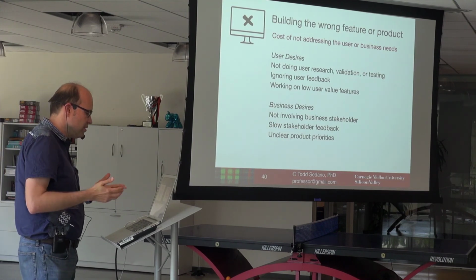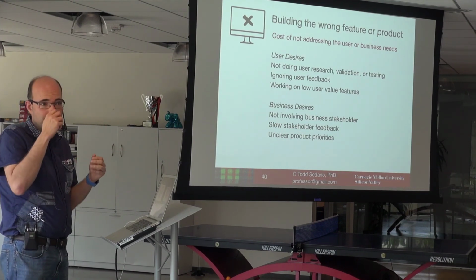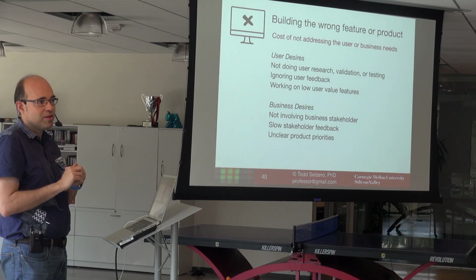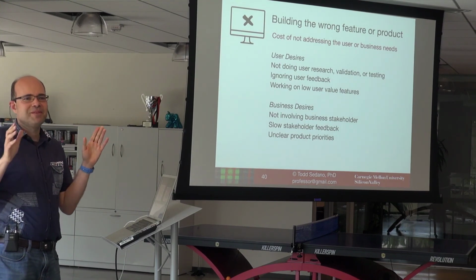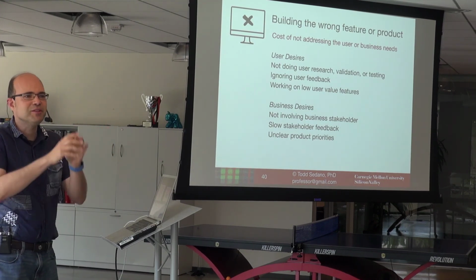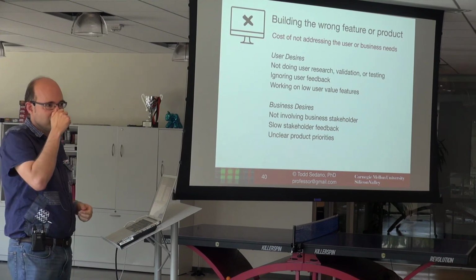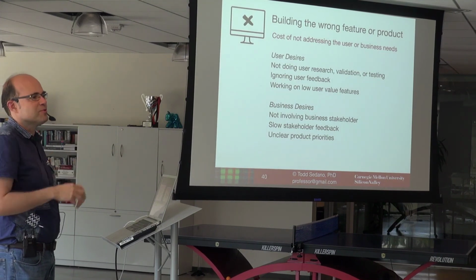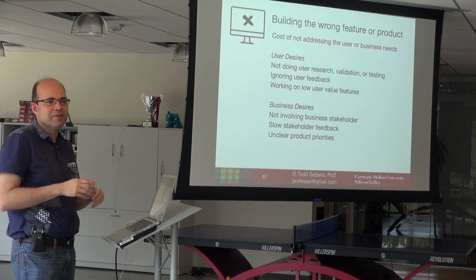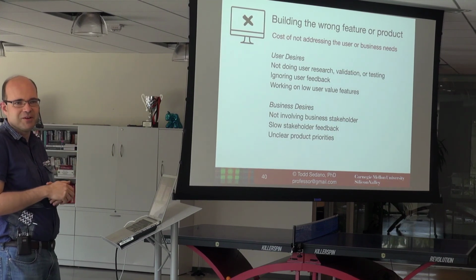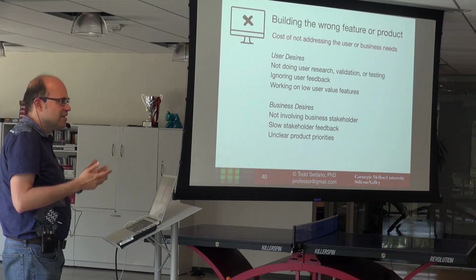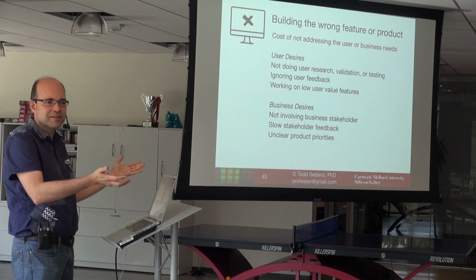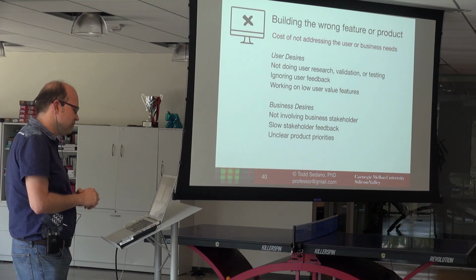So on one of the projects, our client said, hey, we're building this product for this persona. So we interviewed them, and we discovered that this persona did not want the product. And the client said, oh, that's fine. We told you the wrong persona. It's really this other person. They're going to use our product. So we went and interviewed those people, and they didn't want the product either. And they said, it's this third persona. They're really hard to find. You're not going to be able to interview them. Good luck. And so we tried to interview them as well, and they didn't want the product either. At the end of the day, we built it because they're the client. But there was this high risk that once delivering it, the market might not want this thing that we built.